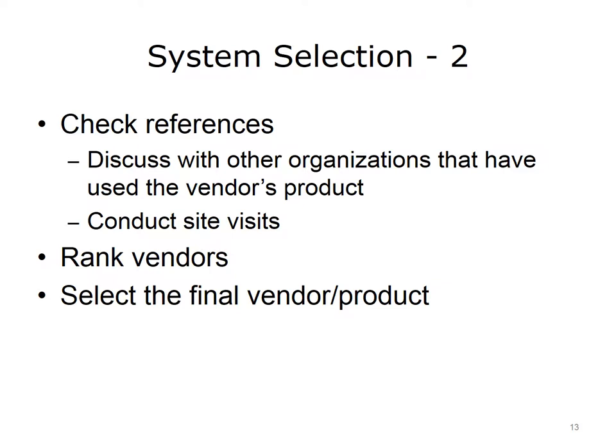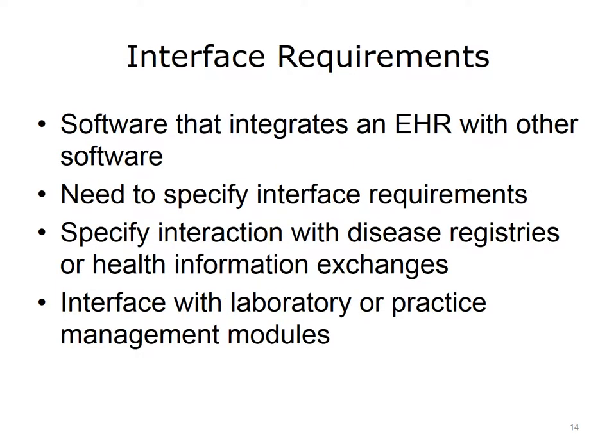After analysis and discussion, the organization is ready to select a vendor and a product. When a system has been selected, an organization next needs to specify data interface requirements. An interface is software that integrates the EHR with another piece of software, such as a practice management system, or with software at another organization, such as an outside laboratory or another EHR in a health information exchange. The organization will need to determine whether the selected EHR needs to interface with a laboratory, practice management module, disease registries, or health information exchanges.